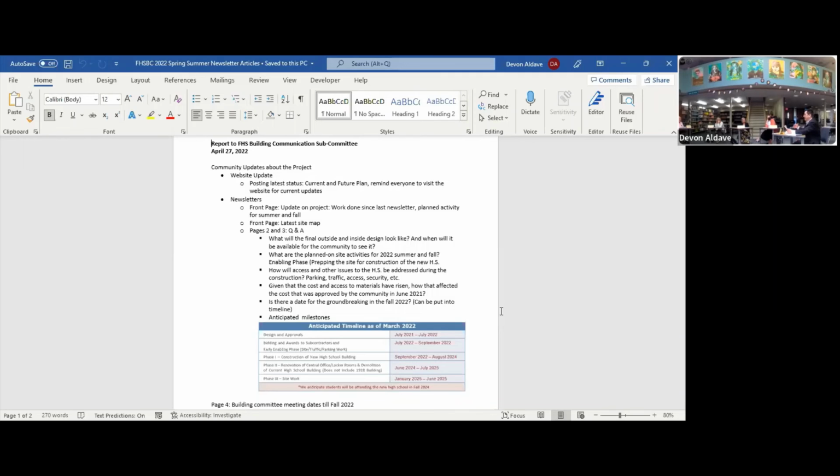They're going to come in the summer, and there's going to be six weeks of activity here. The temporary fence is going to go up, they're going to move a big giant pile of topsoil, and set up a temporary parking lot, traffic patterns, everything. Then on the first day of school, you set the stage from day one, so that kids, parents, and visitors start to get used to the traffic pattern throughout. Then the work is going to go away for a little while, because we're going to finish up the final drawings, and then in September we're going to bid the documents. We'll be out to bid in September, and groundbreaking will probably be September or October.